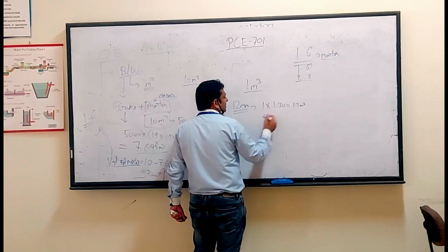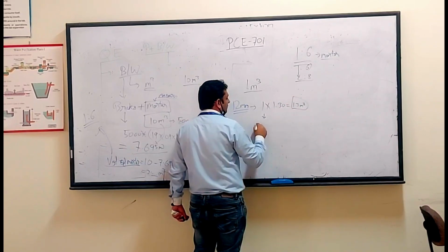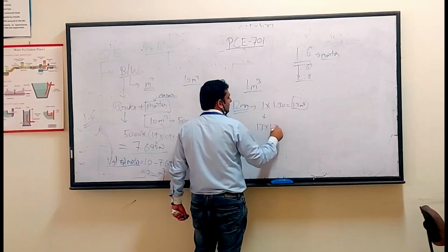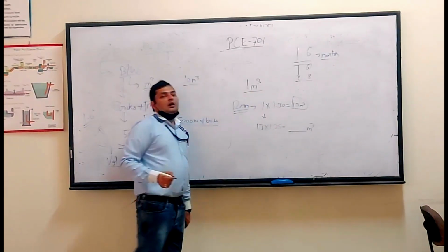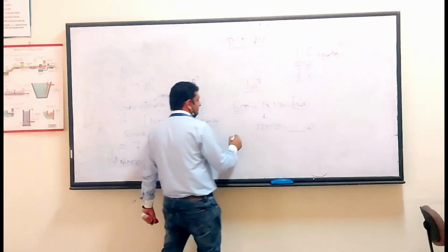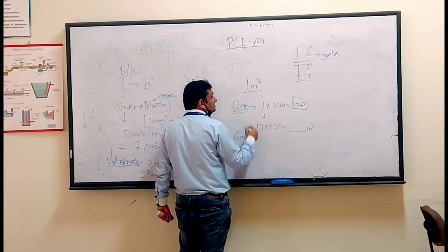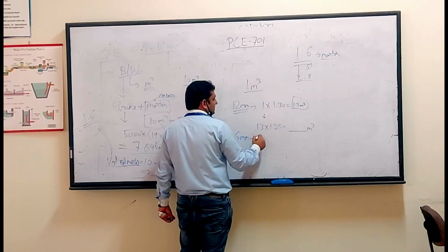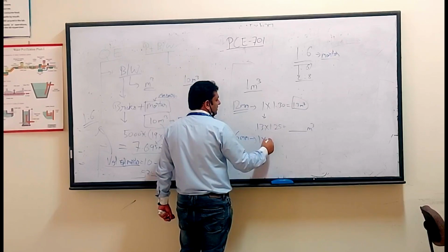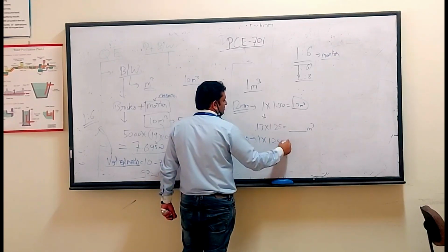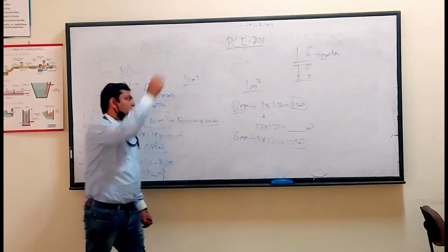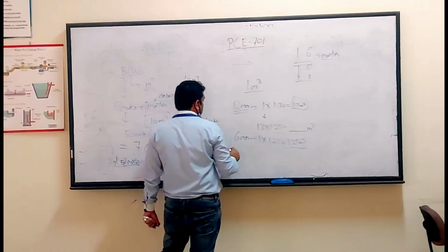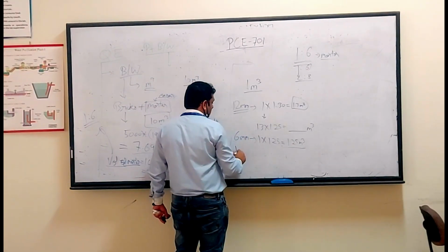After that, this is the wet quantity. From there, you have to convert this quantity into dry. We will increase the quantity by 25%. For the 6 mm ceiling plaster, since there are no uneven surfaces, we won't be increasing it by 30%. The ceiling quantity is again 1 cubic meter. We will increase the volume by 25% and we will get a quantity of 1.25 cubic meters.